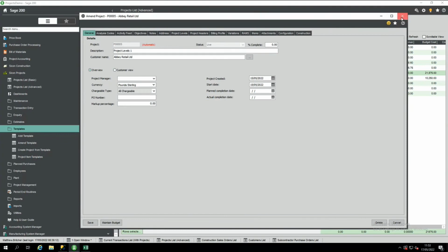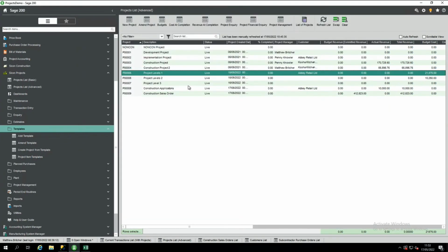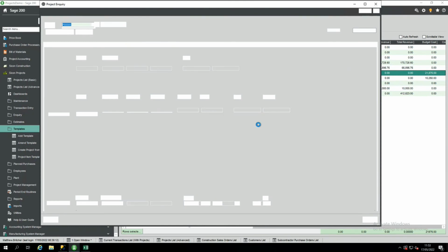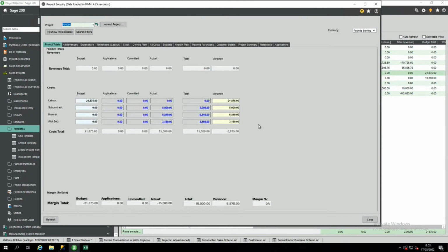Okay. I suppose that actually gives a good concept of why you would use a phase stage activity, isn't it? Somewhere that you want to review those costs. Yeah. It's significant enough. Yeah. And you use the project headers for the type of cost, but you use the phase stage activities for where within the project you are.